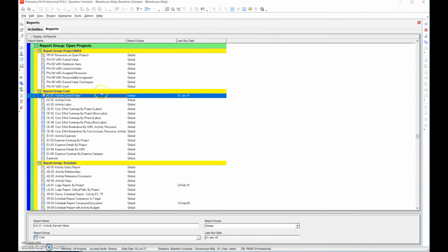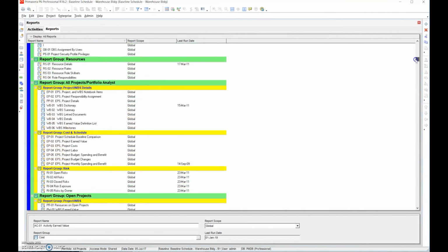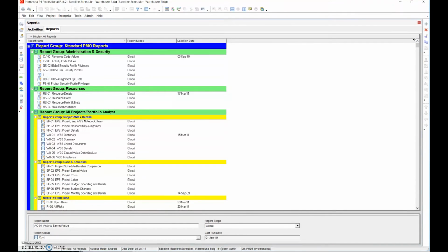Earned Value Report's one of them, but you can run a total float report, you can run a logic report. It all depends on what the customer wants for you. Standard reports I know that people like to see are the banded Gantt chart, the continuous flow, a network diagram, an earned value report, which I've shown you all of those now, a critical path report also with that, if I hadn't mentioned that, and the last one is the narrative.